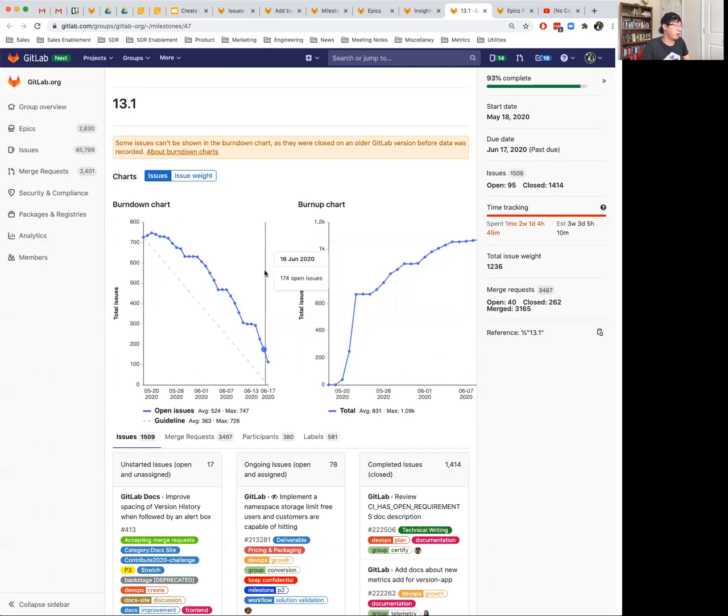One of the things that's really hard as an engineering leader is forecasting how long our major project is going to take. And that's something that Burndown Charts tell you. As you can see, as we keep on scrolling to our right, whatever date corresponds to this part of the chart, that's what we can target for our release date.